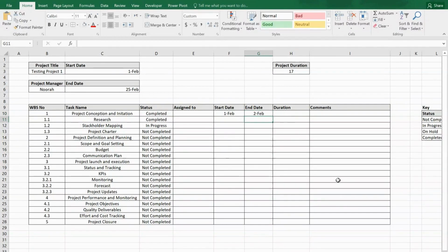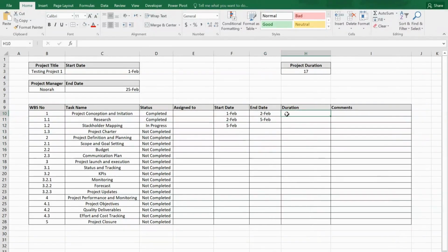We have used the network days function to calculate the duration of completed tasks. So here again, we will use it. Start by typing an equal sign to begin the formula. As you type net, a suggestion bar will appear. Double-click on network days to select it.